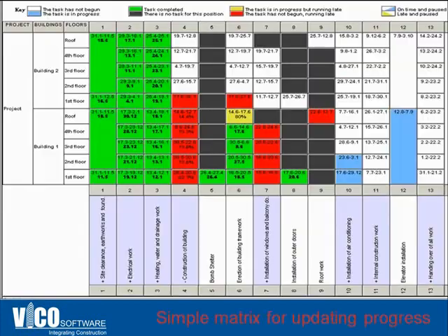So basically what I was explaining was that every Friday the superintendent could walk the site with a PE, send out this chart after they look at different locations and the completion of those locations to the subcontractors on Friday evening. So by the time they come back on Monday morning to the subcontractor meeting, they will have answers to all the red cells, and they will have a plan for making sure that these delays, these problems, are going to be avoided in the actual construction.